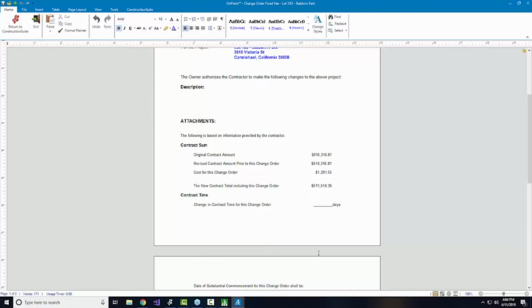Now, a common question, if we look back on cost estimating or Construction Online, and when you start to put these things together, a common question I get from my clients when they're putting change orders together is, wait a second, why does the profit that I've already set for the estimate not show up in my change order? Is something wrong? Do I need to make an adjustment? And the answer is no, nothing's wrong at all. What we've done is purposely give you a system. First of all, we don't want to make your actual margin number incorrect, and including the change orders would do that. But also we want you to have the opportunity to apply a different markup to the change order. Your best practice, and in most cases, the change orders are going to cost you more to begin with, just because we're not pre-planning for those with the project. Usually they're going to be more costly to you and your business.